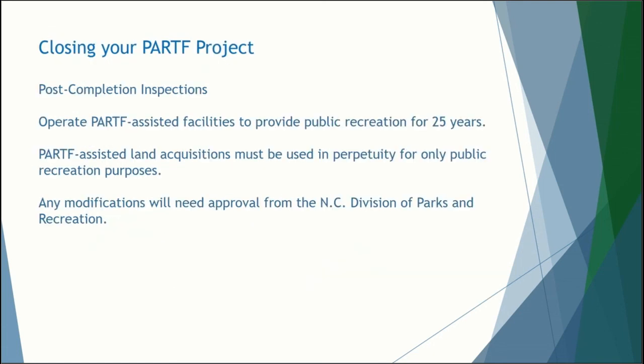Once your project is considered closed, your obligation is not over. Post-completion inspections will be conducted at least every 5 years and you must operate PARTF-assisted facilities to provide public recreation for 25 years. PARTF-assisted land acquisitions must be used in perpetuity for only public recreation purposes. Any modifications will need the Department of Natural and Cultural Resources approval.